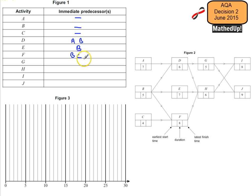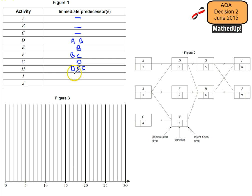For G to start, D needs to be completed. For H to start, all three of D, E, and F would need to be completed first. In order for I to start, both G and H would need to be completed. And similarly, for J to start, G and H would need to be completed.